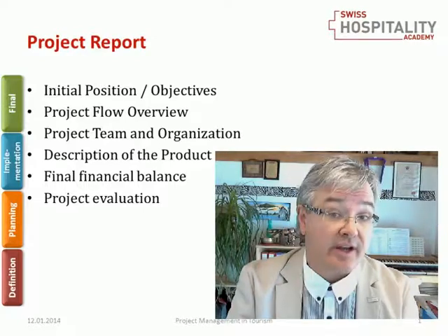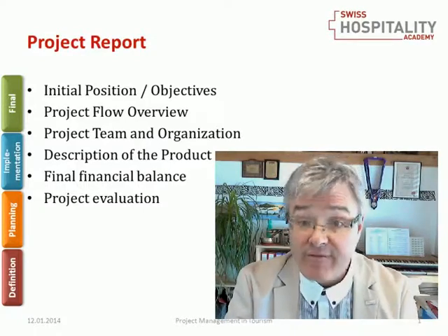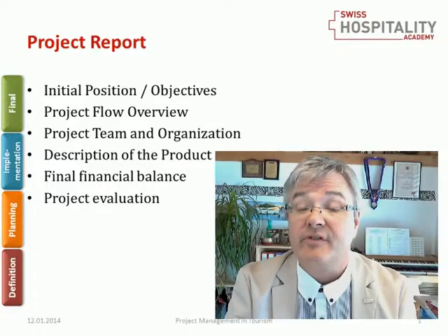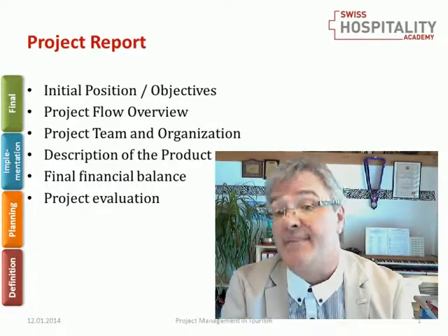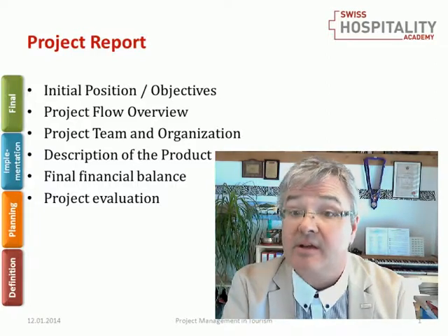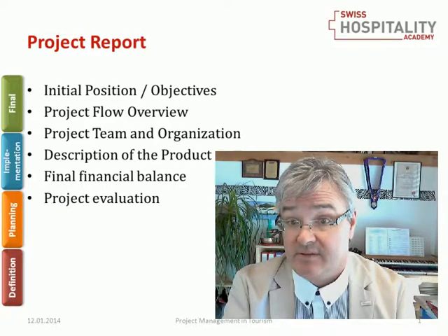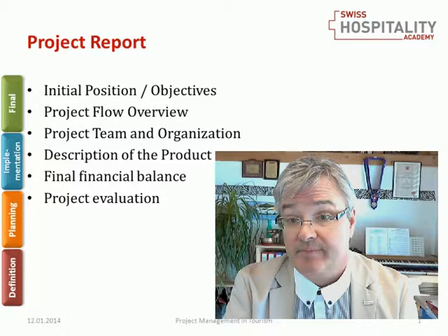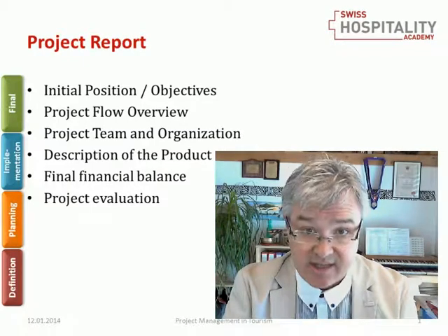We want the hotel on a 4-star level. We have a 4-star superior hotel. Done. We want to have the hotel opened on the 1st of November. We opened on the 15th of December. Not fulfilled. Reason? Blah, blah, blah, whatever. Not an excuse, just state it.